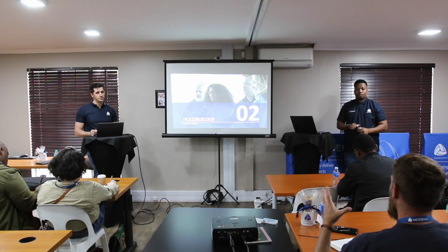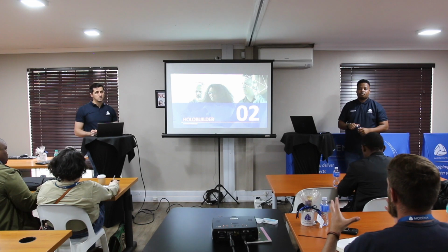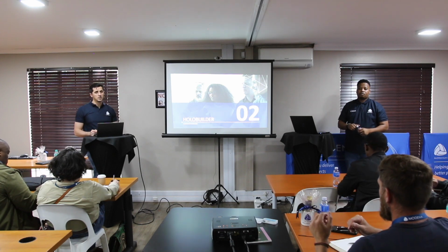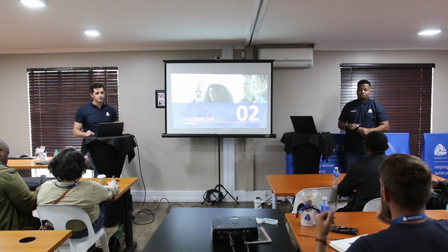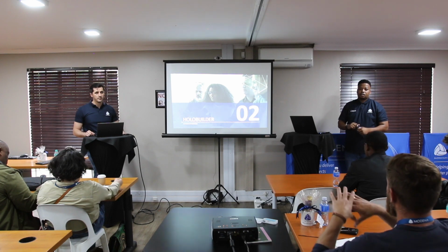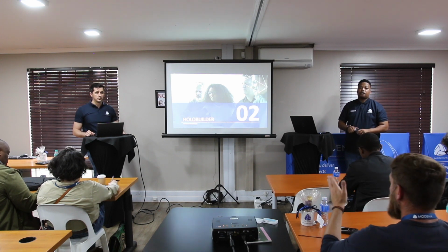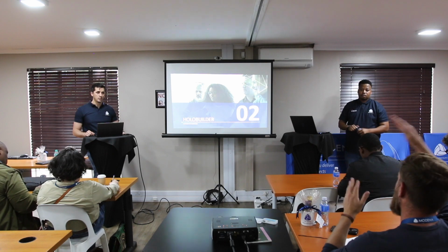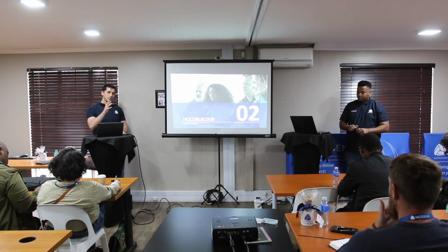So you have a 3D model, and that 3D model understands that there's 10,000 cubes of earth removal, or whatever the case is, and it understands from the program that you've got so much time to do that, and that's your cost curve. So your cost curve is your fifth dimension, which you'll put on top of your 4D. It's not a prerequisite, but there is a way that you can start estimating your costs in relation to your project activities at a certain date.